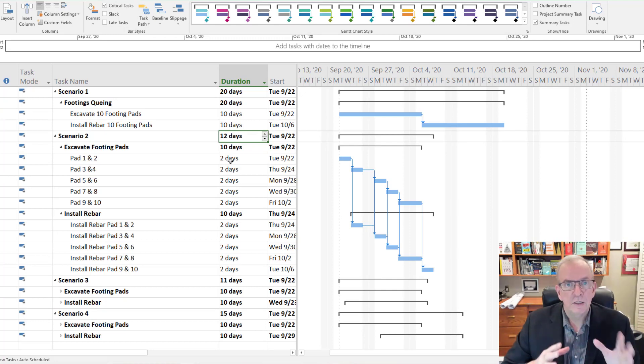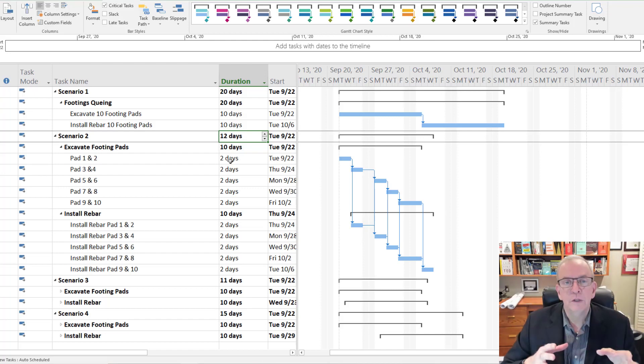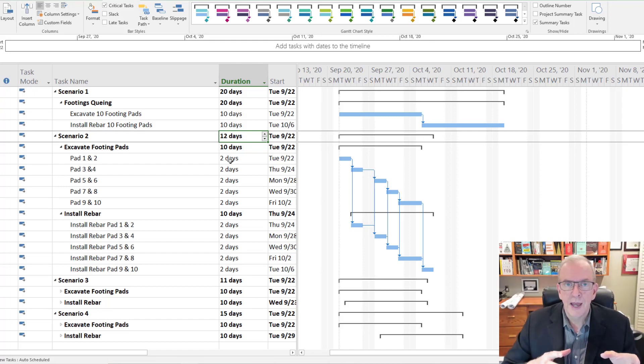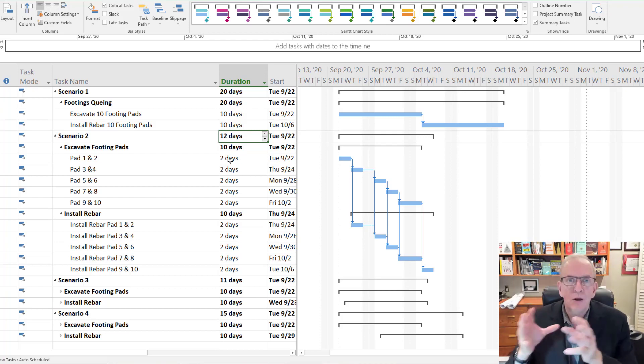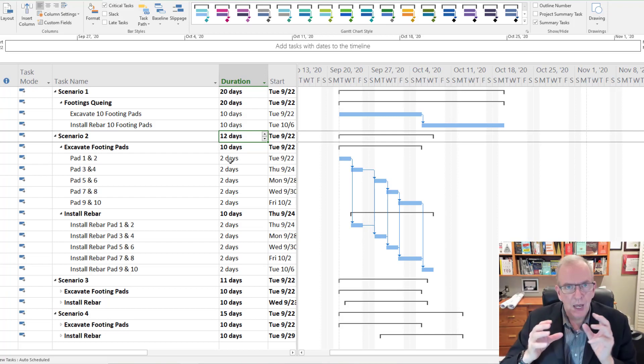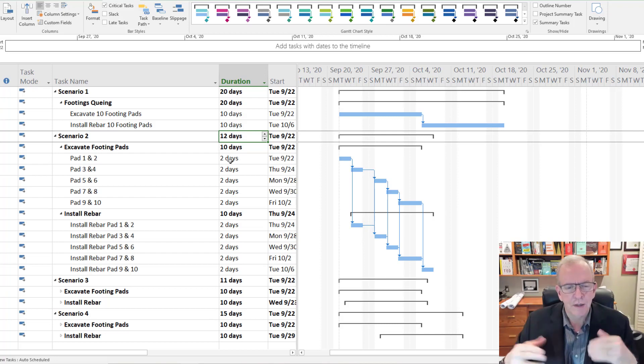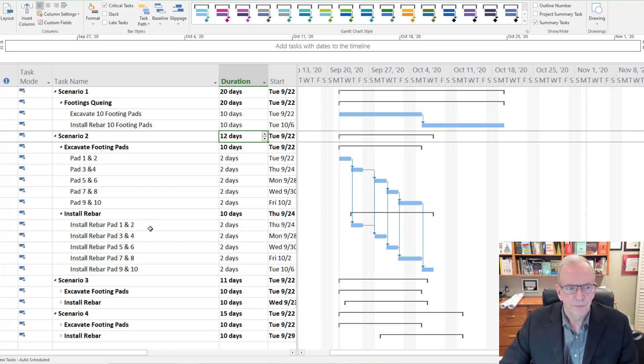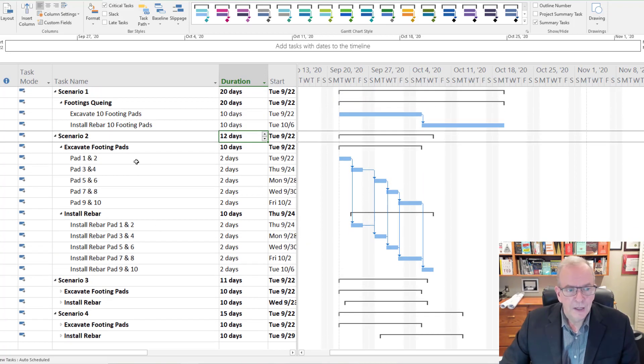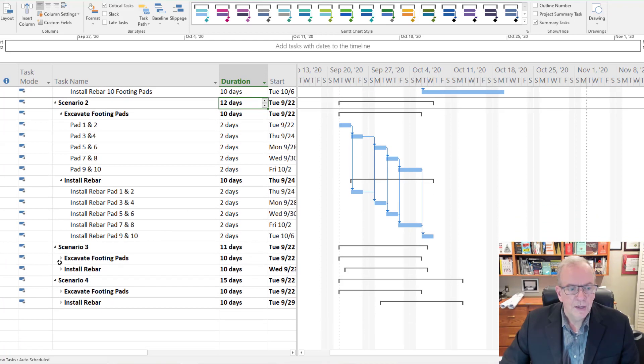That is a lot of administrative costs, and that is a lot of overhead costs that are freed up. The other thing is the opportunity cost. If your field team is there longer on that project, there's the lost opportunity cost of being on another project. So you can see that flow, and that's flowing and substantially shorter.